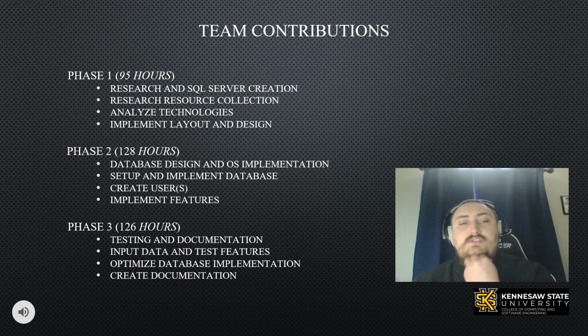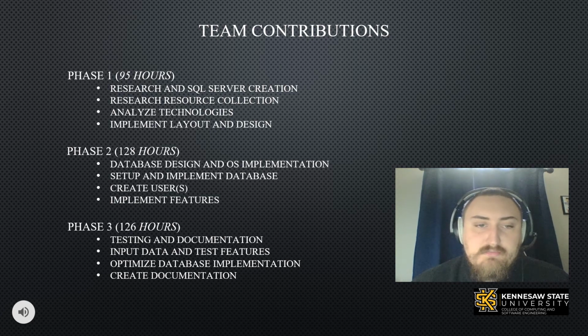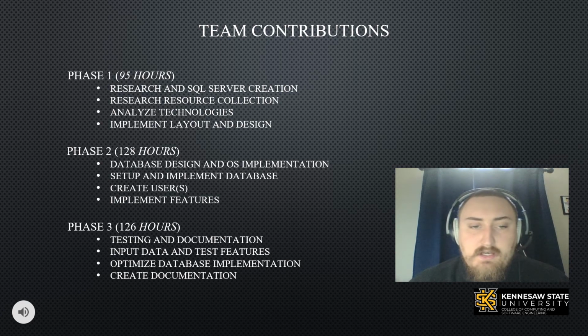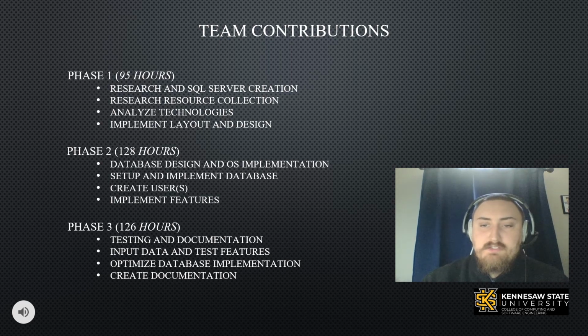Phase 2, 128 hours: database design and OS implementation, set up and implement databases, create users, testing user accounts, all that good stuff. Implement features. And then phase 3, 126 hours. We estimated testing and documentation, inputting data and test features, optimize database implementation, and of course create documentation to help hand off this project to the next class. That'll be my slides, and I will hand it off to our next team member.